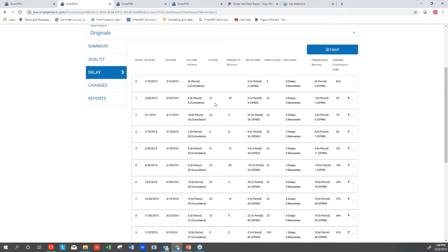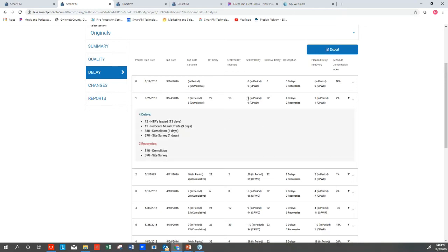So we know that something was delayed day for day for the entire period potentially, or close to it. And all of a sudden they did something out of sequence. Something had to happen anyway. And this is proof that the person who was managing the project, managing the schedule, saw the delay for what it was and did some out of sequence work to stay ahead. And we want to know about that. What we see here is that there was a 9-day total delay, 8-day kick out of end date. That's generally close to each other, meaning that there weren't too many changes that altered the future of the job or are questionable.